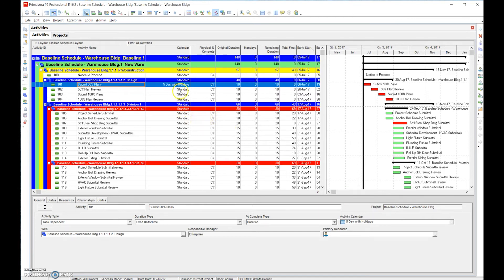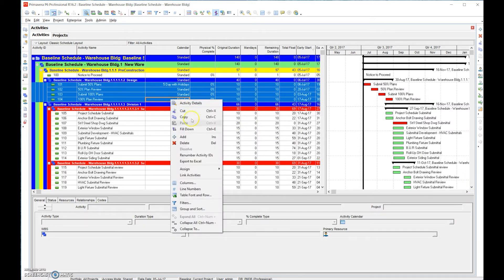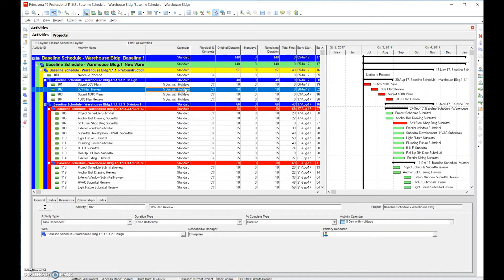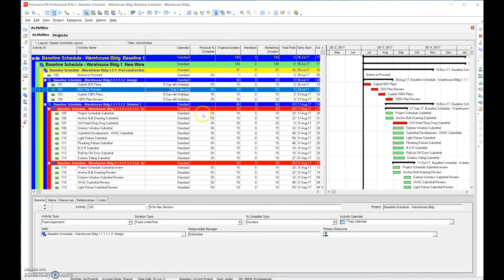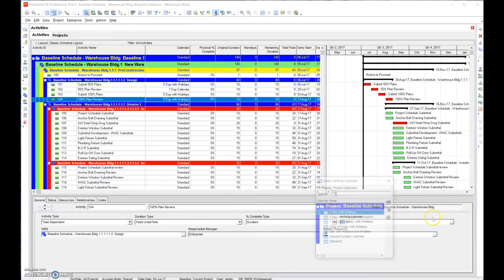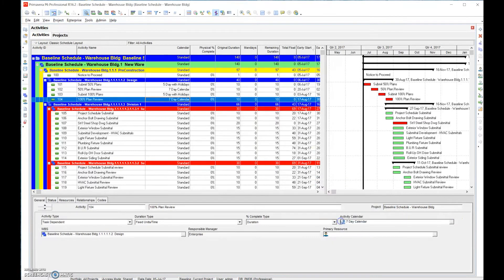We'll select everything in here and then we'll simply right click and fill down. Actually there's an error there because this is a plan review and a plan review should be on a seven day calendar. It's easy enough to change as we see fit.